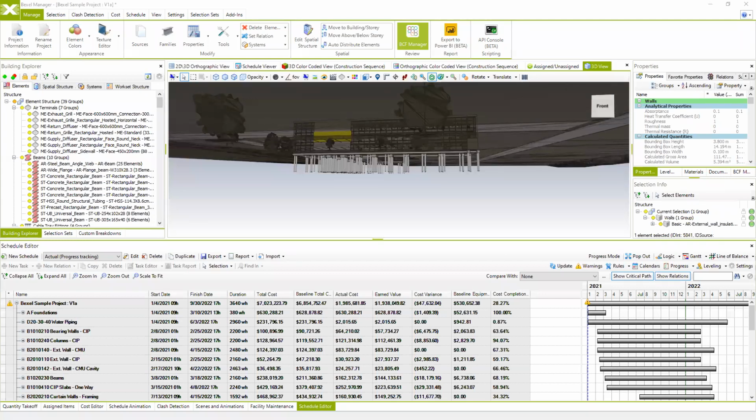How does it work with fixed price contracts? Does the program always recalculate the project? If you have fixed price contracts, these are used as baseline contracts. If you have a contract with a contracted fixed price, then you can specify that these are the prices which are not going to be changed, and you can link your schedule to that cost version, which is not going to be changed.